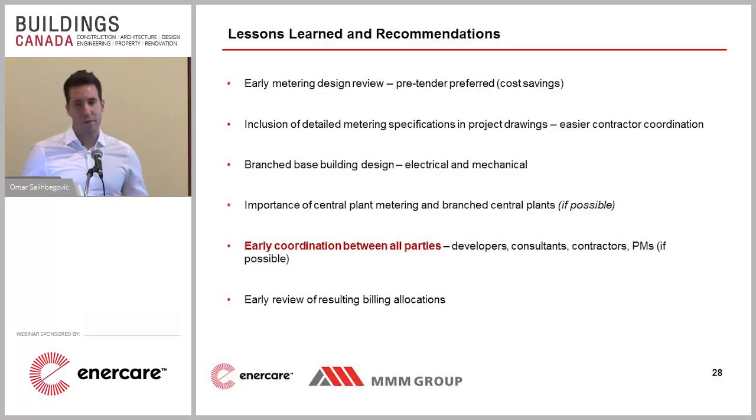Finally, to conclude, if you haven't already gotten the gist through this portion of the presentation, the biggest takeaway is sub-metering has to be coordinated early on for ease of coordination between everybody. I can't begin to tell you how many angry calls from contractors I've had, or meetings with developers and contractors to determine how meters should be installed and where they go, because metering came in so late after the design was completed. Branched base building design, so we talked about that.